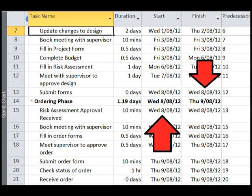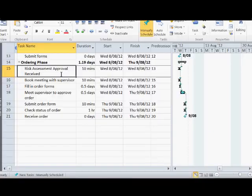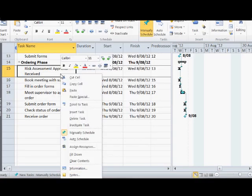For example, between submitting the risk assessment forms and obtaining the risk assessment approval, you may need to wait 10 business days. Therefore, to add lag to risk assessment approval received, select the task.